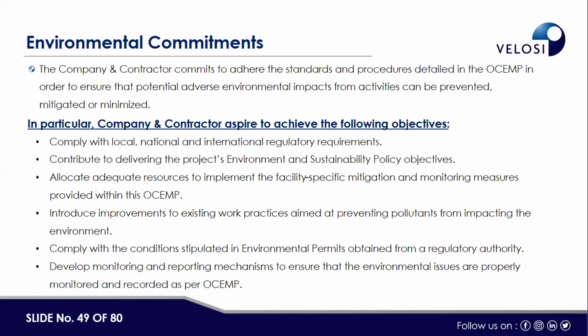They will also comply with the conditions stipulated in the permits. So after approval of this EMP, whatever conditions are identified by the local authority, they will comply with all those conditions, and they will also develop the monitoring and reporting mechanism so that they can see how effective this EMP is, and whether they need to update or review the EMP.